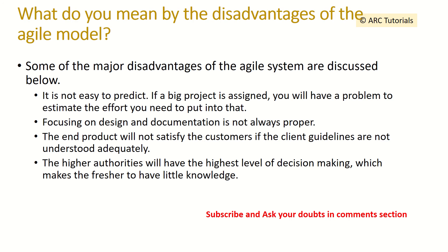What are the disadvantages of the agile model? This question tests whether you are aware of any flaws. Some major disadvantages are: it's not easy to predict efforts upfront for a big project, because complexity makes it hard to estimate time for each feature. Focusing on design and documentation is not always thorough, leading to discrepancies later. Due to continuously changing requirements, the end product may have to exclude some features, and knowledge may not be thoroughly transferred to all team members.